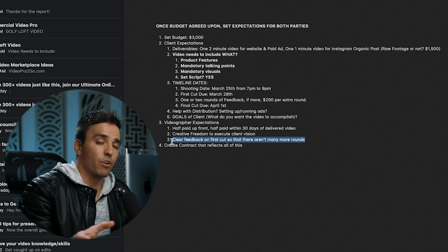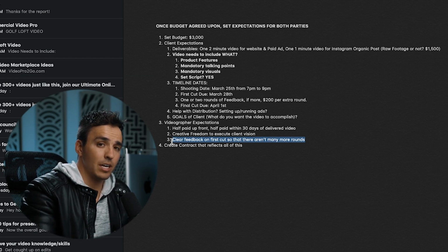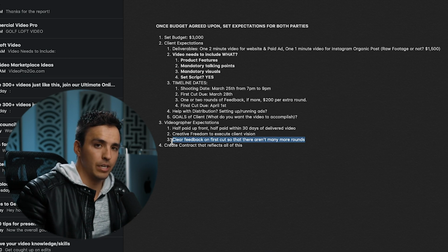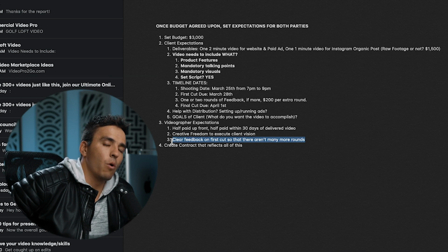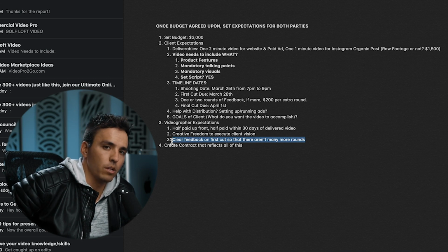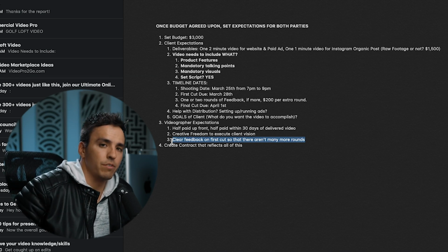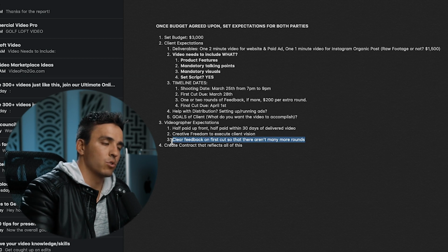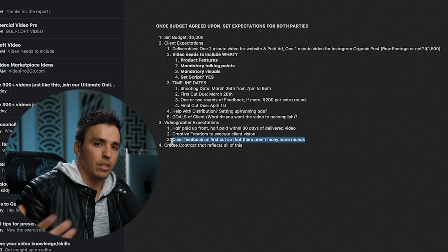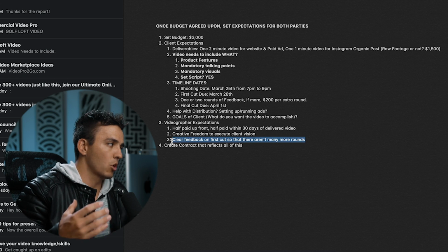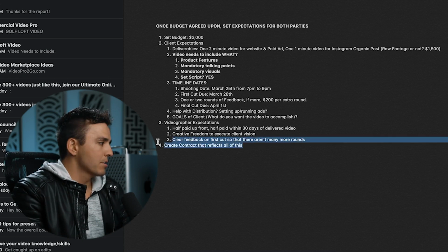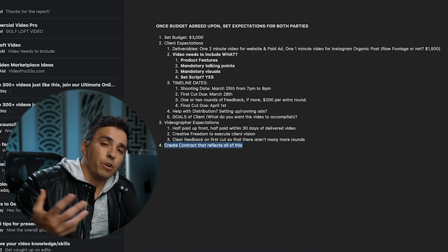And then if I make any further mistakes, you can correct those on the second round, but there shouldn't be a new list of things to correct because you've changed your mind and said, oh, actually, now that I'm thinking, I want a whole other list of things changed as well. No, I need everything on that first round of feedback that you want changed. If it's not on that first one, I shouldn't be expected to change anything else beyond that unless I haven't correctly changed those things.